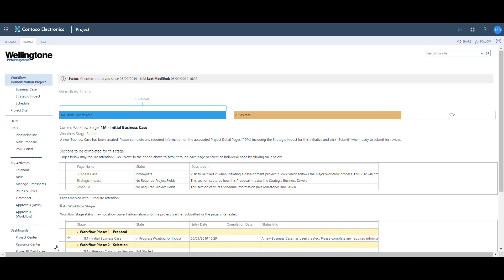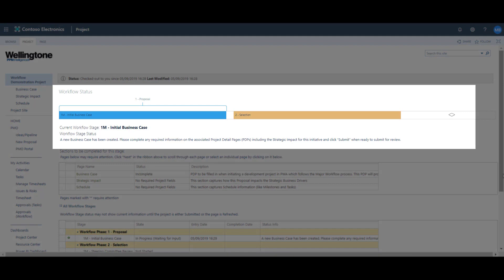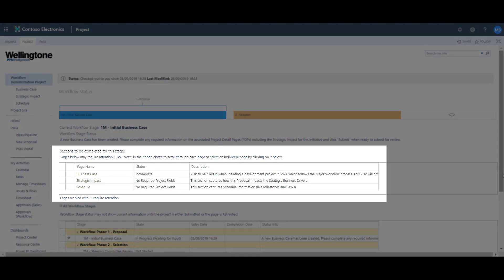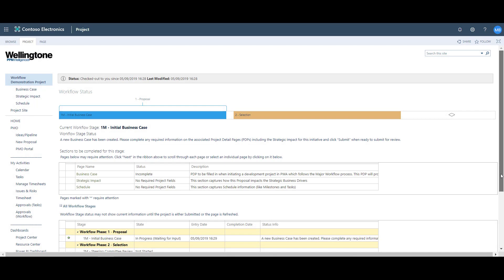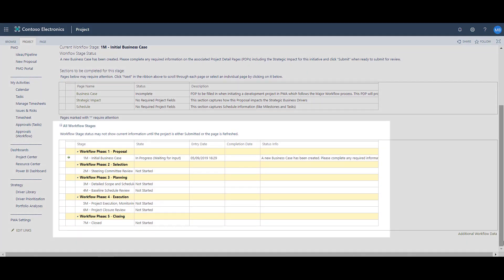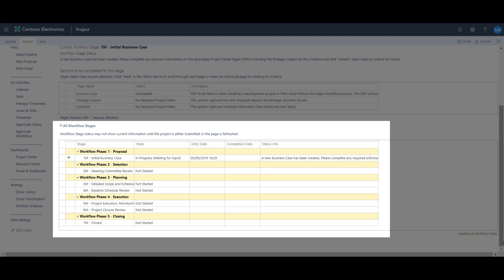This is the workflow status page. You can see that the newly created project is in the first stage of the workflow — it's in the proposal stage. On this page we can also see the sections to be completed. This area provides a list of the project detail pages to be completed in the current phase, and it also confirms which project detail pages do and do not contain required or mandatory fields. If I scroll down further, we have the all workflow stages section, which is a summary table that confirms the current state of each workflow phase.